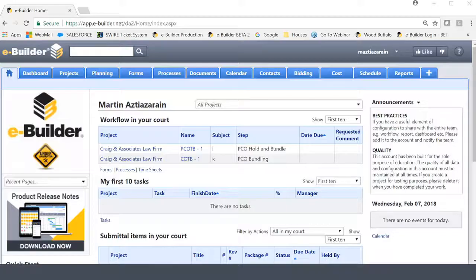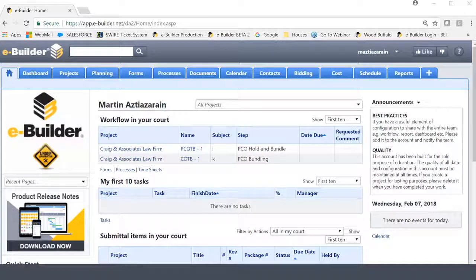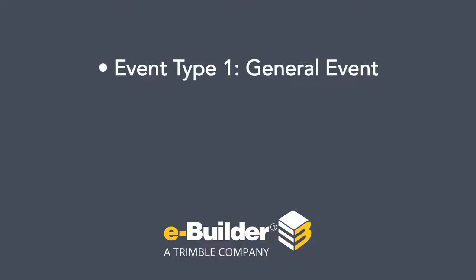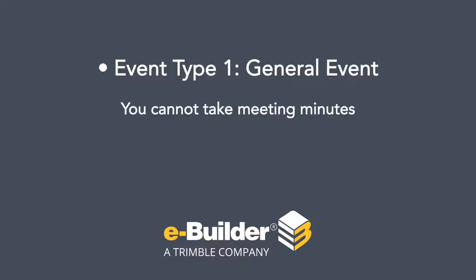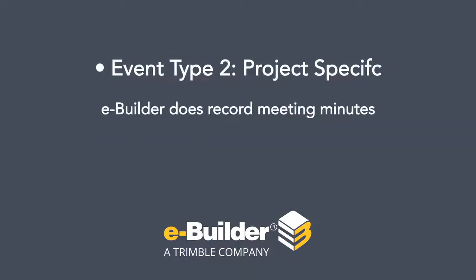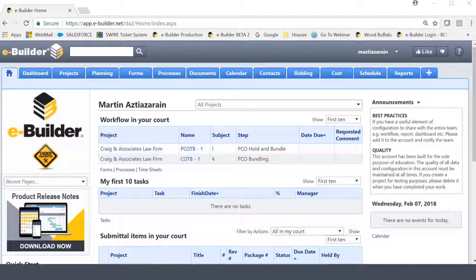Now, the main differentiator between the two meeting types, which I will show you very shortly, is that the general events meeting type you cannot take Meeting Minutes in eBuilder with. In other words, eBuilder does not record Meeting Minutes for general events. However, eBuilder does record Meeting Minutes for project-specific events. So let's begin.